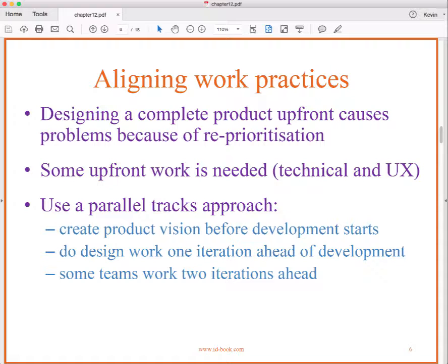Okay? And that's to say, we take all of our requirements and we express them as user stories, and we put them into a pile that we call the backlog, and we prioritize them. And only the ones that get to the top of the pile ever get implemented. Okay? And so they have to compete for the attention of the team. It's a real survival of the fittest.